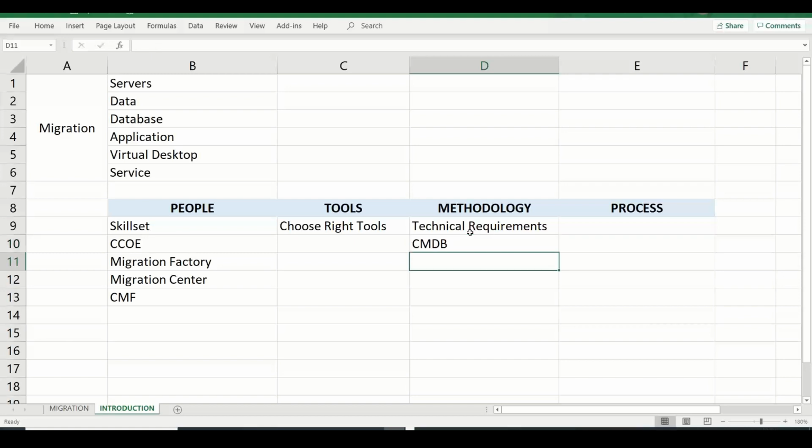But besides that, you need to understand the business, how exactly they work, what is their change calendar, and what is the time that they don't allow any execution. So what is the crucial time for that particular business, and you need to understand the business. Then I will also help you with how to build a business case. We need to create a business case because we need to measure, right?